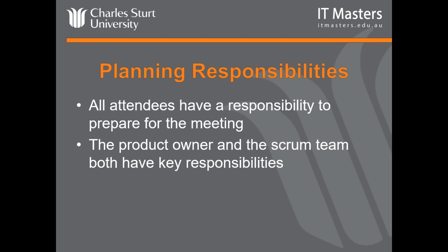Obviously, the Scrum team has to review the features backlog. They need to have a high-level understanding of the features that might be included. They need to determine the mechanism they're going to use to record their high-level estimates: effort hours, story points, t-shirts, dogs, and define their team velocity, so what they believe the work capacity for the team is going to be.